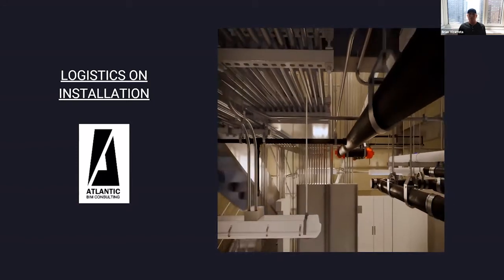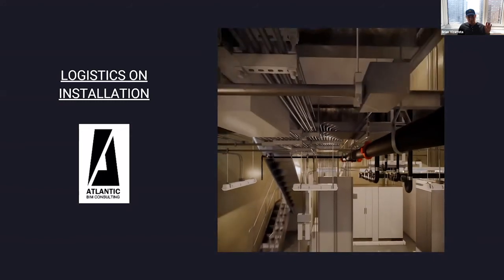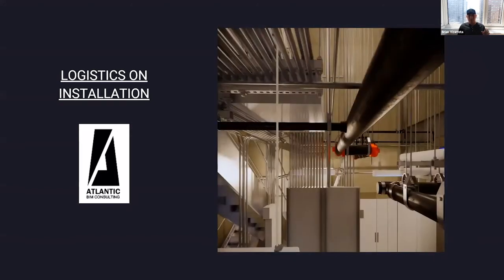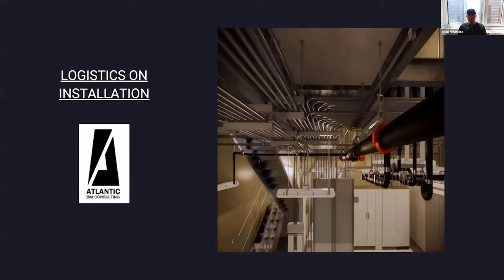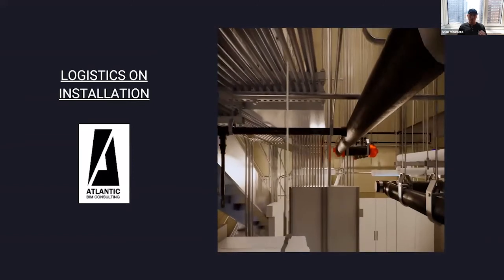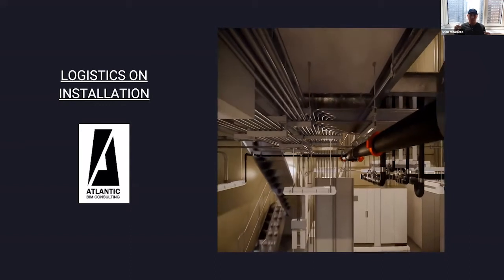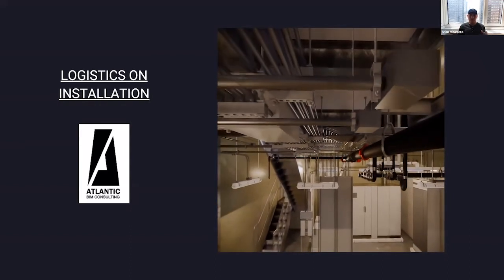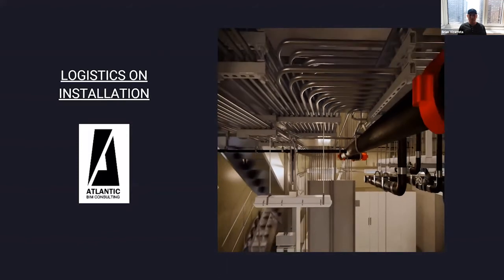And something somebody told me that always stuck with me as well was mechanical systems and penthouses are all about sequence. If you can coordinate and plan the sequence of how things get installed and you make sure those get installed correctly, then you will be successful. But once things start going haywire and off the rails of how people kind of want to go, that's when those big mess ups start happening.